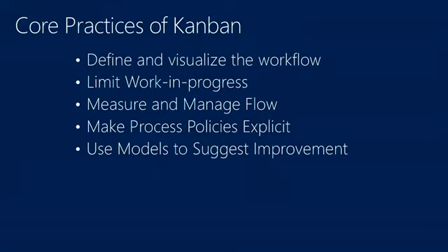The other 2 things about Kanban that are really important that we'll review before we move on is that it throws the concept of an iteration out the door. XP sort of invented the iteration. Scrum definitely formalized it and then called it a sprint. In Kanban, there is no iteration. It's just constantly pulling items through the system. So the concept of the 2-week iteration or the 1-month iteration goes away with Kanban.